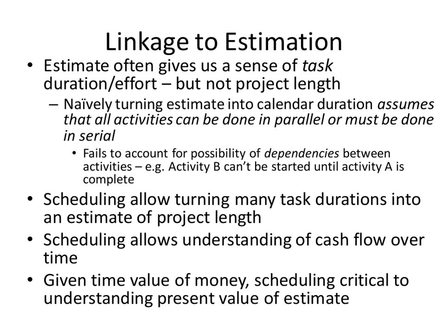Now, it turns out that scheduling is very widely used not only to understand the timing, but to understand the cash flow as well. This is particularly key in other industries such as construction, which, like software, have very custom projects, but where there's a very strong attention paid to it, because it's very capital intensive, and you've got to pay subcontractors and for material all through the project often.